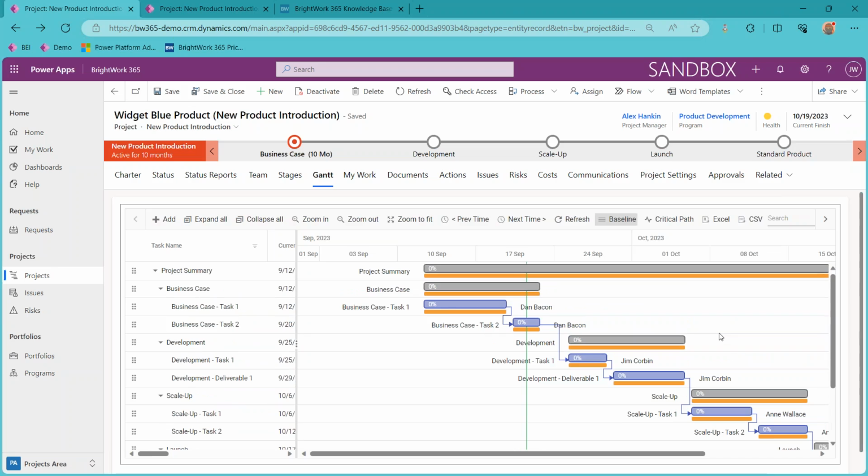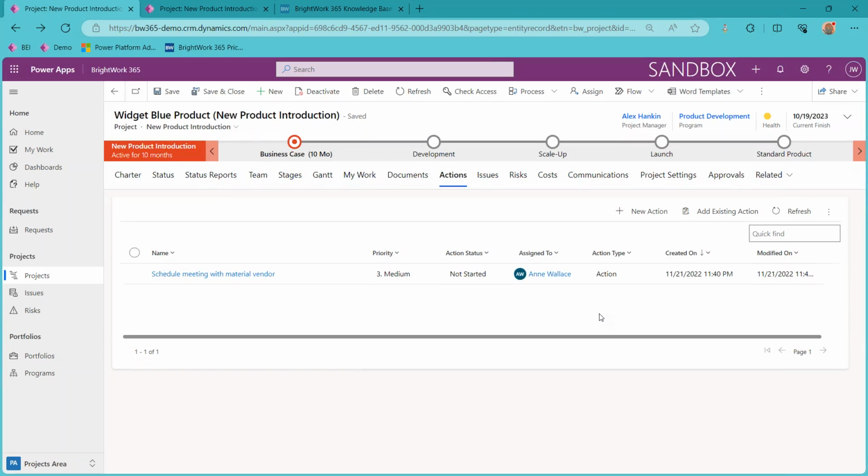You might want to do a new baseline so that you can see further changes that might happen down the line. Now, before you go ahead and do a new baseline, which we do allow you to do, what you're probably going to want to do is get approval, right? So you could do that through whatever means you want. It might be phone calls, it might be some sort of a weekly meeting to get approval to do a rebaseline from your stakeholders. You could also avail yourself of our actions module here.